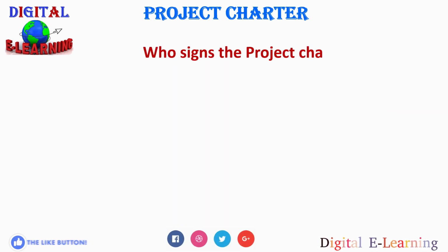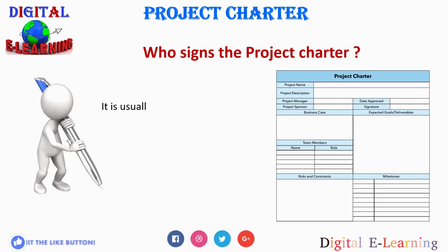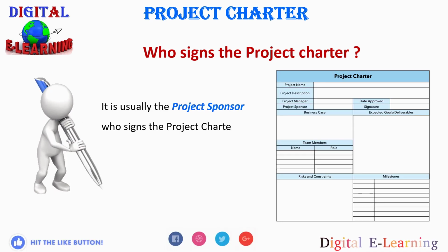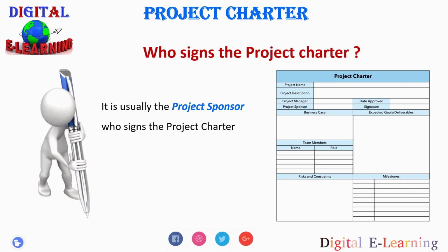So who signs this project charter? Keep in mind that although the project manager may study the project requirements, risks and assumptions and then write them down in the project charter, the project manager is not responsible for signing it. Then who is going to sign this? It is usually signed by the project sponsor.